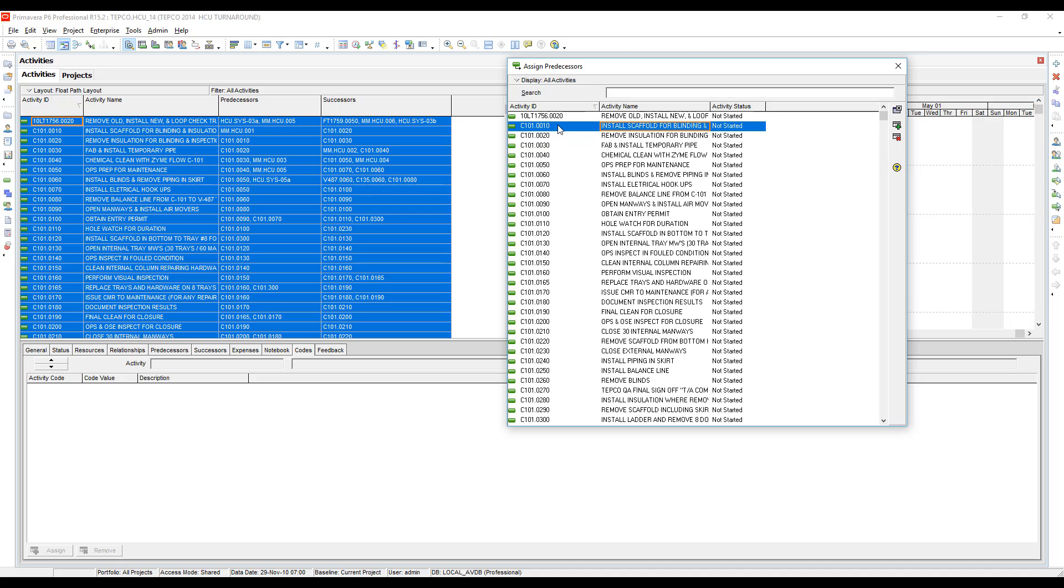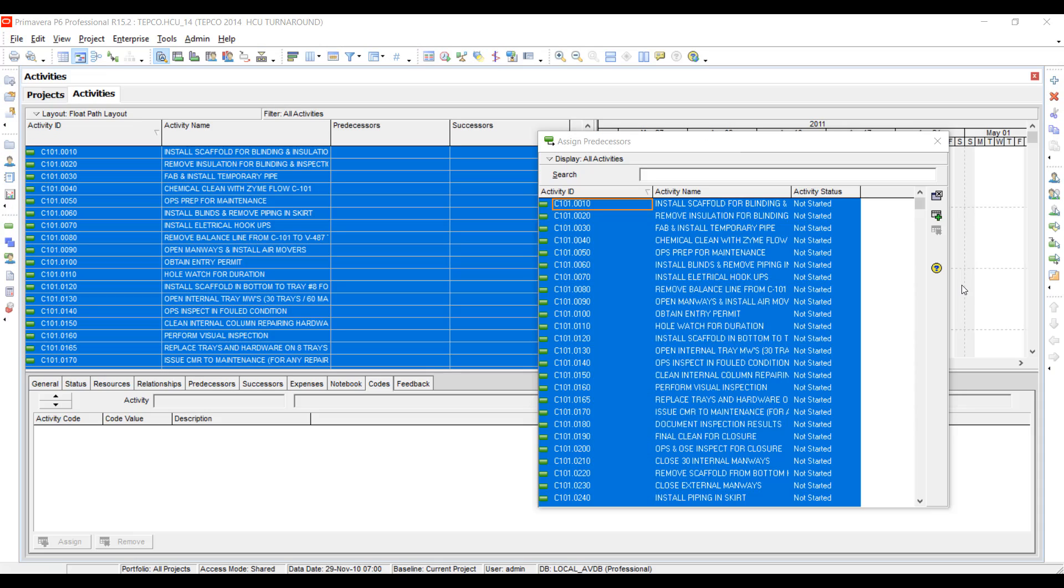With the predecessors window open, you can hit Control+A on your keyboard again, or you could click the top predecessor and shift-click the last predecessor in the list just to get them all selected. This can take a little bit of time, so depending on how large your file is, it could take a few minutes actually for this to activate and select everything. Once everything is highlighted, you hit the red X over on the right-hand side to remove the relationships, and once it finishes up the process, this button will go gray. That will be your indication that it has completed.